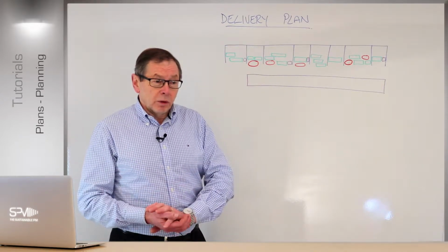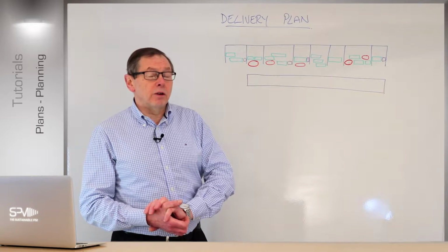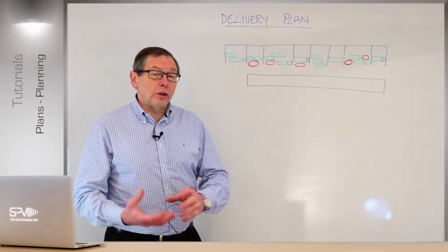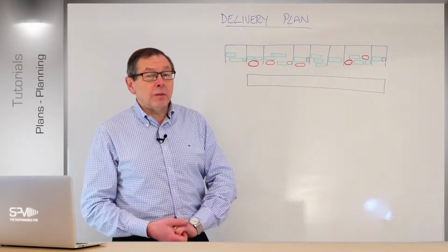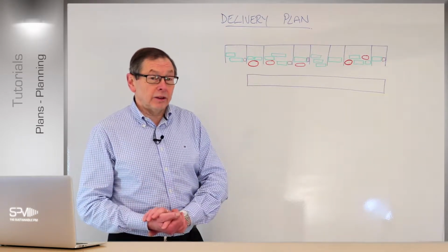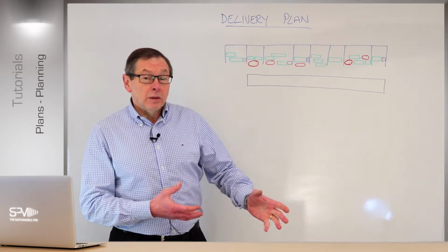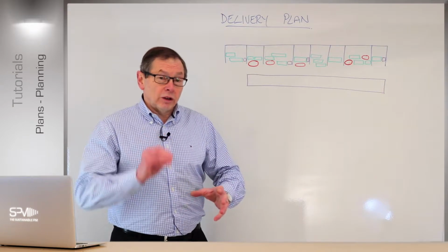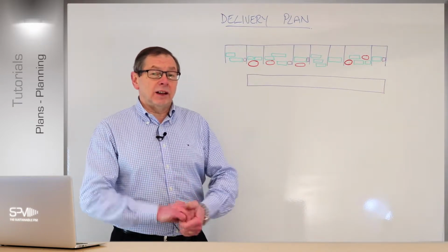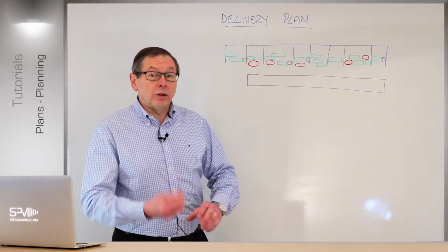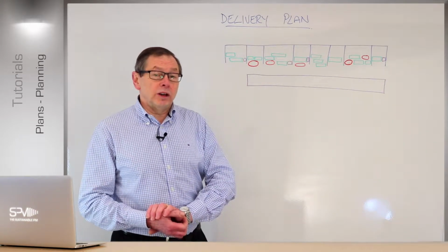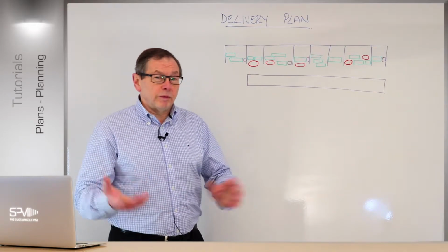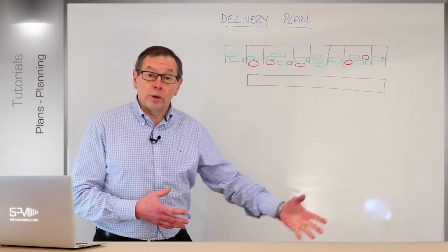When we were running the bank teller upgrade program a few years ago, it was a new concept to have quality of service and prioritizing applications on the network, so this was something we had to pilot. We needed to prove the concept could work first. Once that happened, we did it at a high level to say, yes, at a high level we can get that, the detail will come later. This gave us the trigger to then kick off the rest of the projects and the program overall. We had tried for years beforehand, and for various reasons, like technology wasn't up to it, we couldn't run the program.